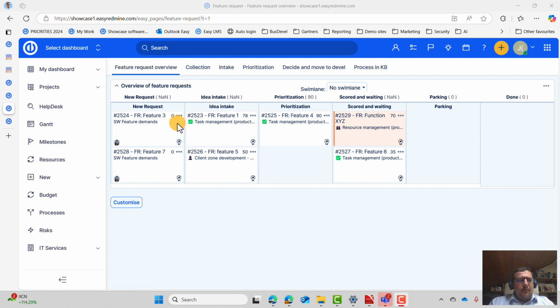In collection, we typically focus on the validity of such requirements. In the sense of collection, we would like this to be open to a wide audience. In the intake phase, we need to check whether a feature request is aligned with our product strategy, and if it does, then in prioritization we engage our technical colleagues in the third phase. That's important for the protection of our resources. So only those meeting our product strategy, we ask for assessment. That allows us to finish the prioritization and also gives us some metrics like value to cost of delivery.